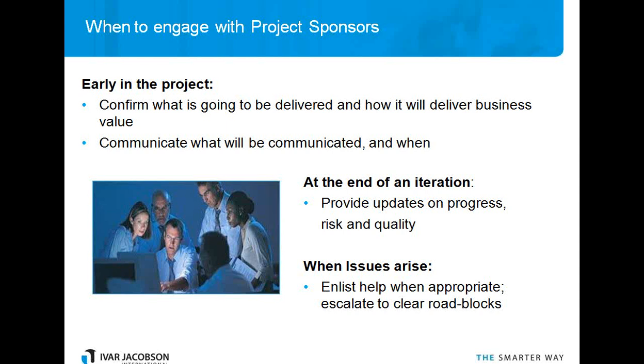So there's a number of touch points at which you need to engage with these sponsors. Early in the project, and I'll phrase it in terms of the Unified Process Lifecycle, in the inception phase, you need to confirm what's going to be delivered and how it will deliver business value. This is really the whole purpose of the Unified Process Inception phase: to make sure that you understand what needs to be delivered, understand what desired outcomes the business needs to achieve, and understand how the solution is going to deliver on those, and that it can actually deliver within the time allotted and the budget committed to the project.